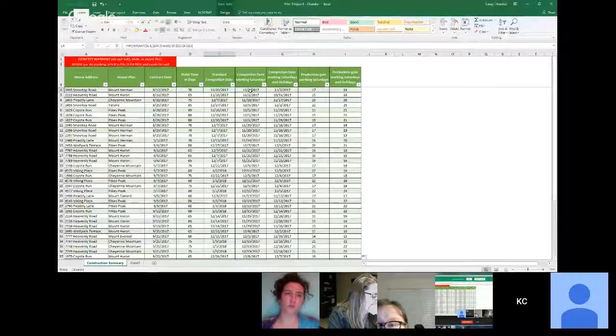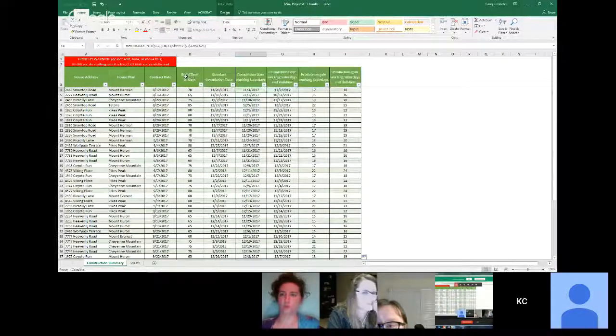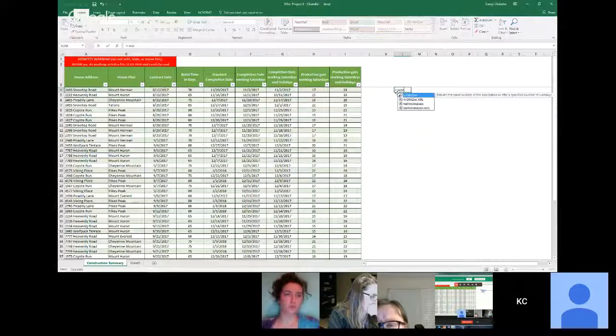Then the completion date, if you're working Saturdays. Now this is where you want to use the workday.intl, because you're going to select this contract date. And I anchored the C so that I could do the pull down to finish them all off. And then the next data set that we're going to select is the number of working days, because that's what it asks for. If I come over here and just walk through, can everybody see where I've selected? Some screens aren't maybe as wide as mine. So I'll just walk through this here.